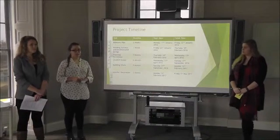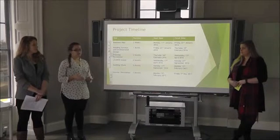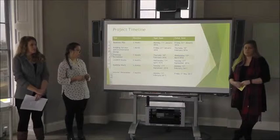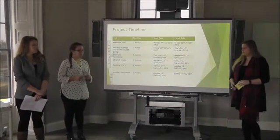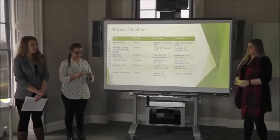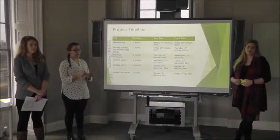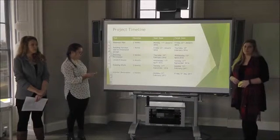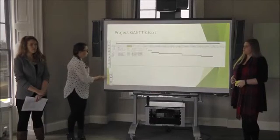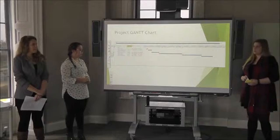A legal grant usually takes about 6 months to come through. Building work could take up to 5 months, but any complications that arise will push us back. Interior decoration would be 3 months. Following on from that, there will be advertising and marketing, which will run throughout the existence of the business, but initially there will be 2 months of advertising before the opening date of the accommodation. A Gantt chart has also been developed as a visual aid of the timeline.